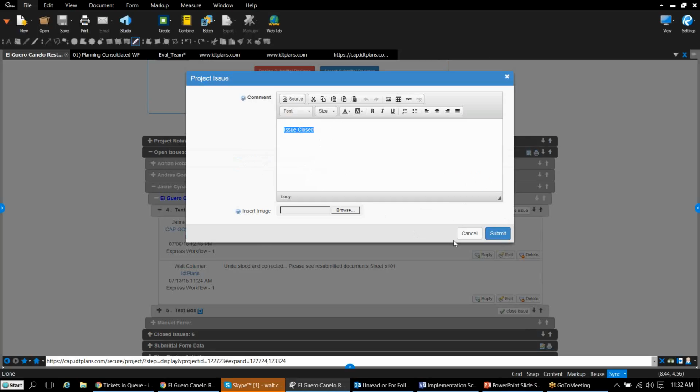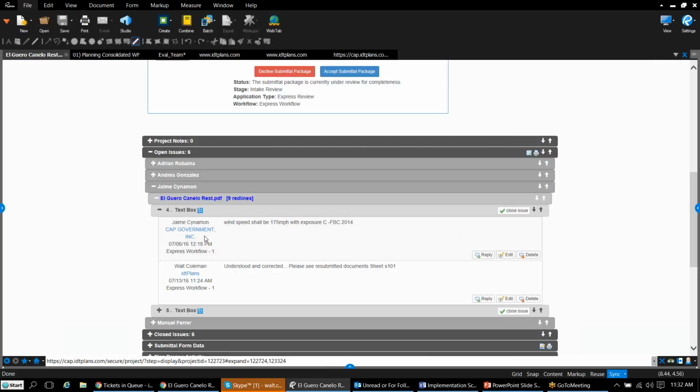If he didn't, I'm going to cancel this. If he didn't find the correction made appropriately, he would reply with whatever additional information, like, I could not find the answer on sheet S101, and that would lead to another rejection of the review cycle. So that's how we evaluate each and every one of these issues. We either close them out or we ask for more information, and it goes into a third review.